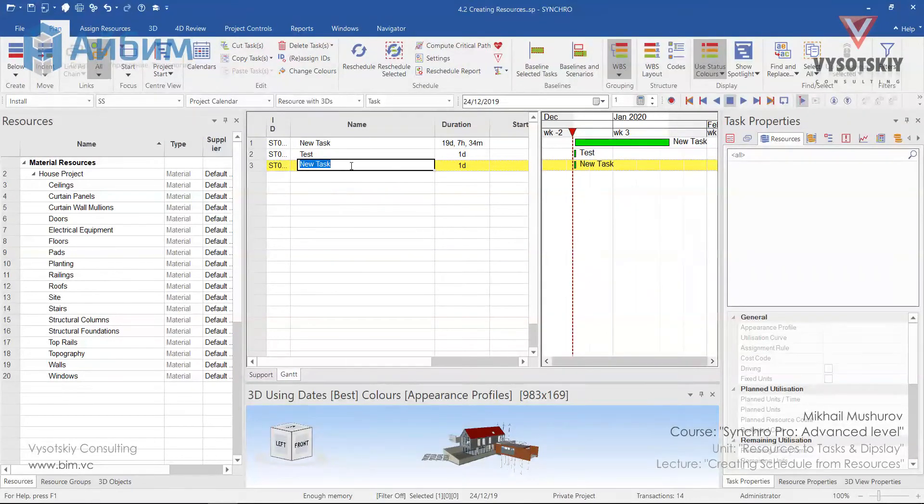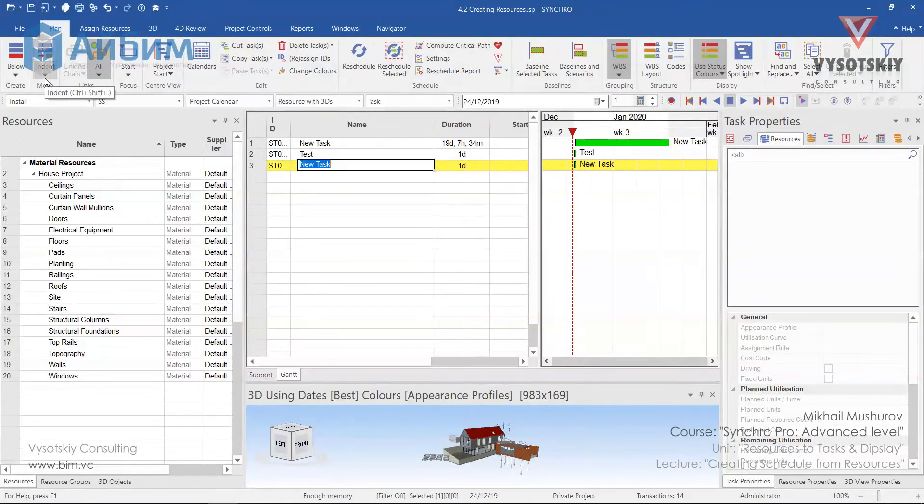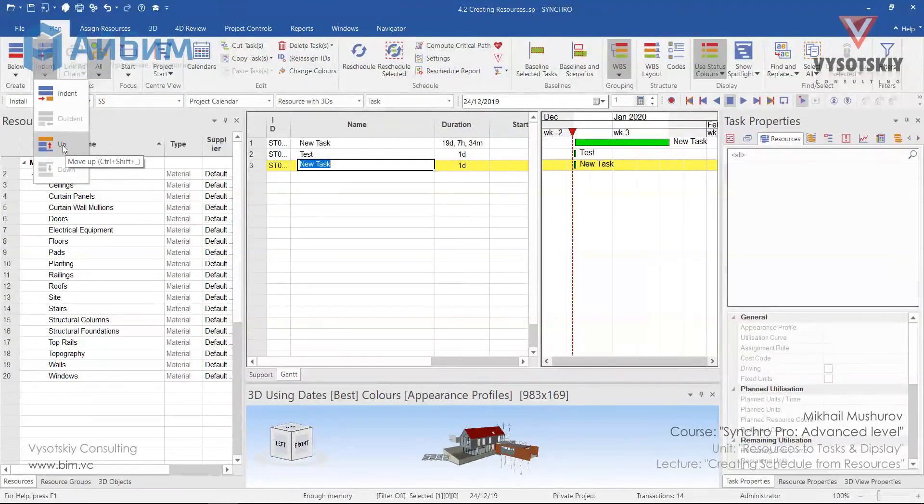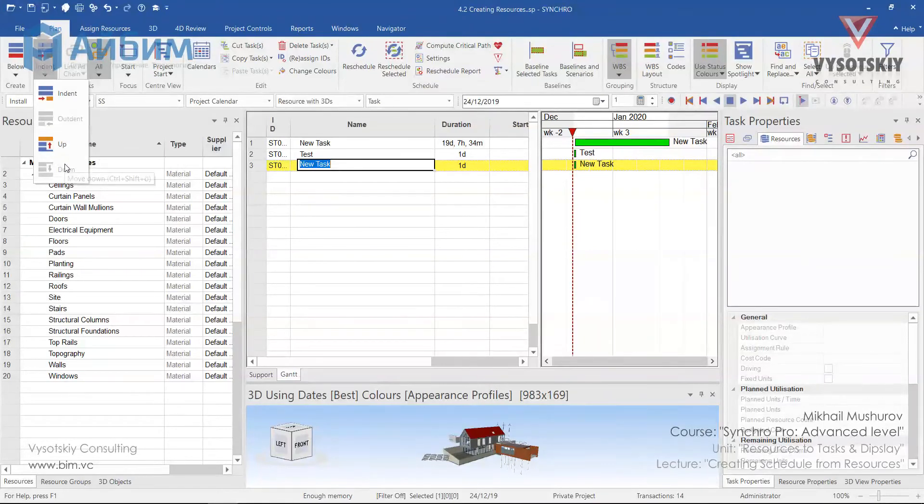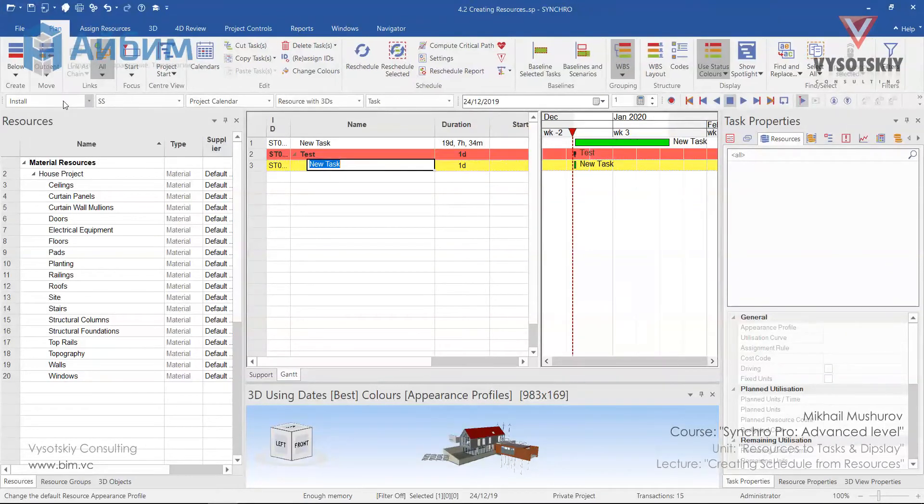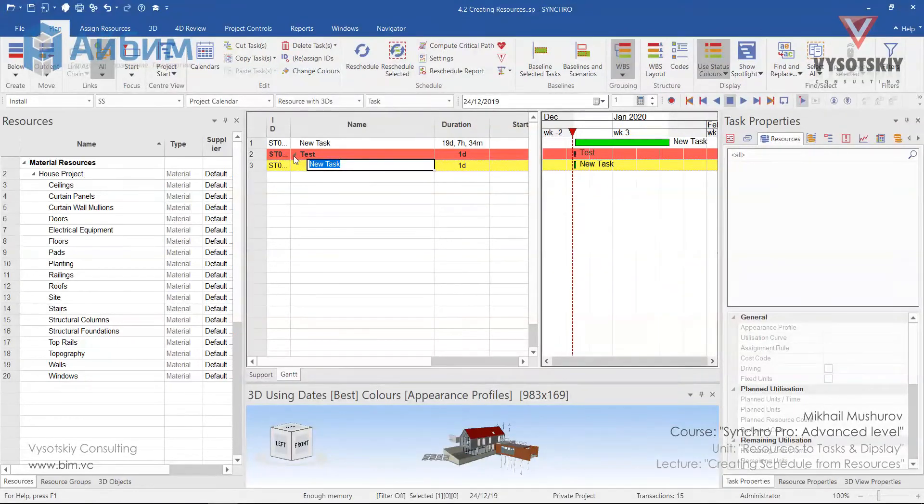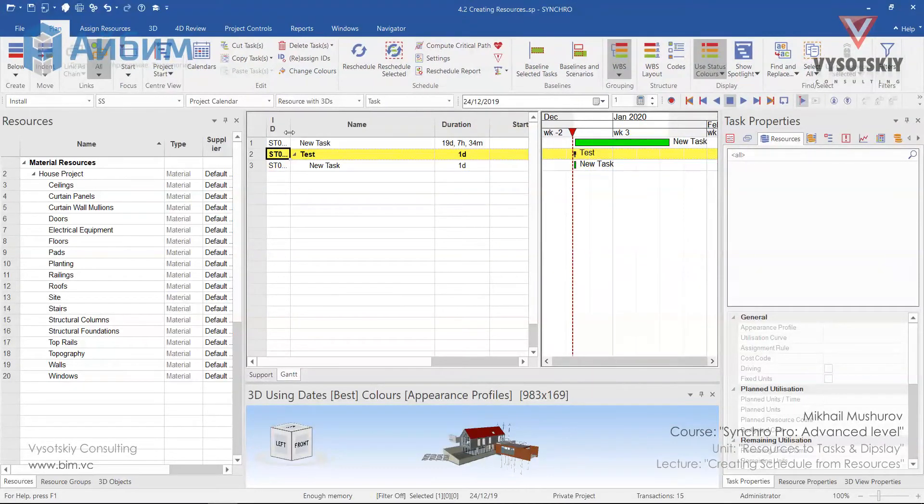Changing task's position as normal or summary task is possible from move, indent, outdent or change position up or down. As we click to indent the task, the task becomes a summary task.